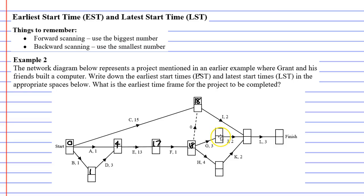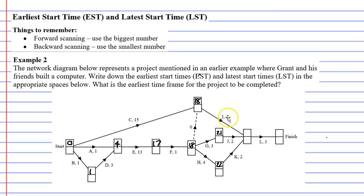Activity G takes three minutes and cannot start until 18 minutes into the project — 18 plus 3 is 21. Activity H cannot start until 18 minutes into the project — 18 plus 4 is 22. Then we get to the next vertex where quite a lot of paths meet. 18 plus 2 gives us 20 as one option. 21 plus 2 gives us 23 as another option. And 22 plus 2 gives us 24 as the third option.